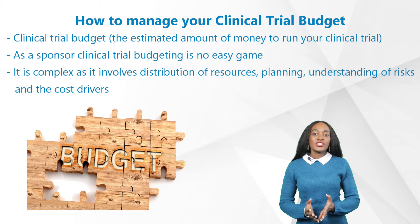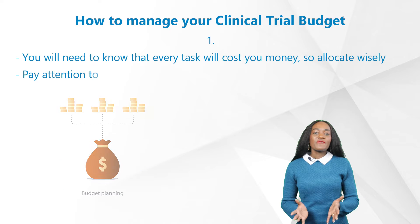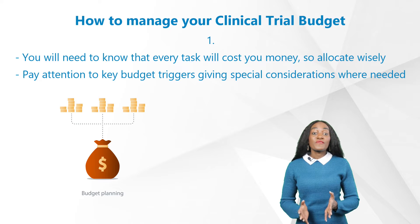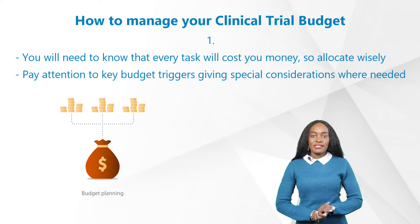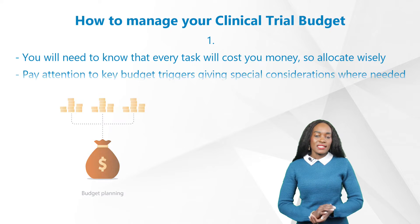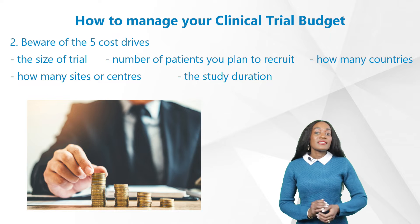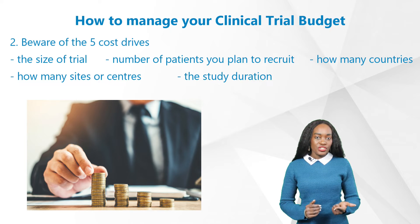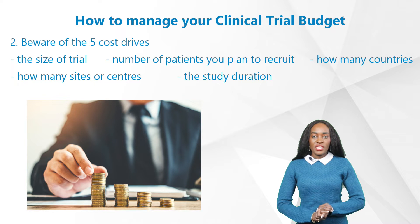This can be extremely challenging, especially if you have a great idea for an innovation but are on a tight budget. Here are a few things you may want to know before you start distributing your budget. First, every task will cost you money, so allocate wisely — pay attention to key budget triggers, giving special considerations where needed. Second, beware of the five cost drivers: size of trial, number of patients you plan to recruit, across how many countries, how many sites or centers you will involve, and the study duration.